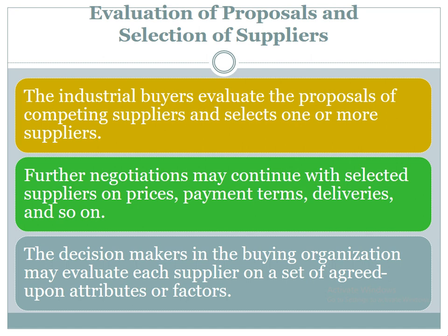That is, what they want to say is, suppose we have parameters like quality, then distance, and then reliability. Suppose we finalize these three parameters. Then quality may be given a weightage of 60%, and distance and reliability will get a weightage of 20% each. So though there are three parameters, those three parameters are not equally distributed in terms of weightage, like 33, 33, and 33%. Quality is given higher weightage, like 60%.